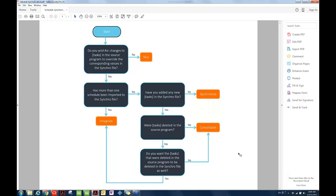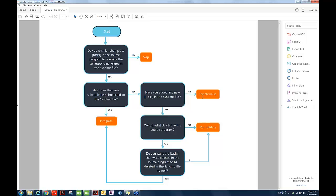Skip. The first option is Skip. By choosing Skip, the associated attributes will not be modified or updated in Synchro. The second option is Synchronize. By using Synchronize, the associated attributes will be synchronized according to the following rule. Attributes added, deleted, or modified in the source project will be added, deleted, or modified in the target project. In other words, by using the option Synchronize, the source project will completely replace the attributes in the target project in Synchro.